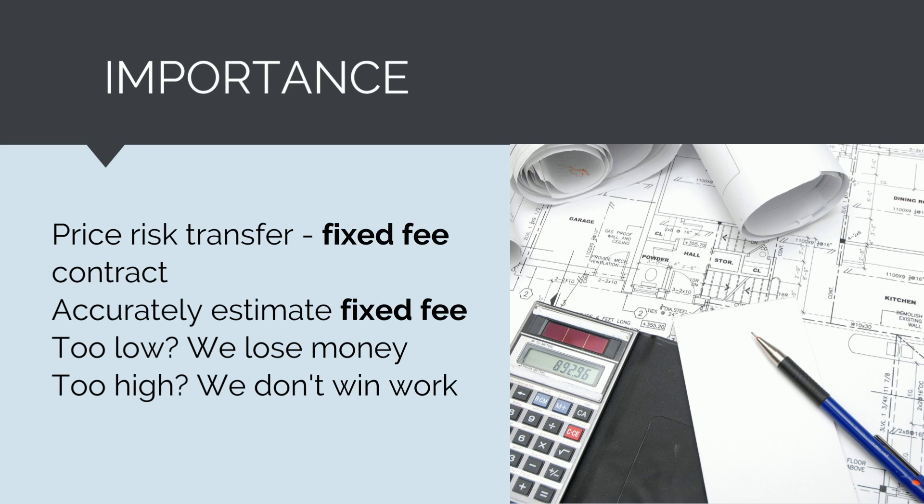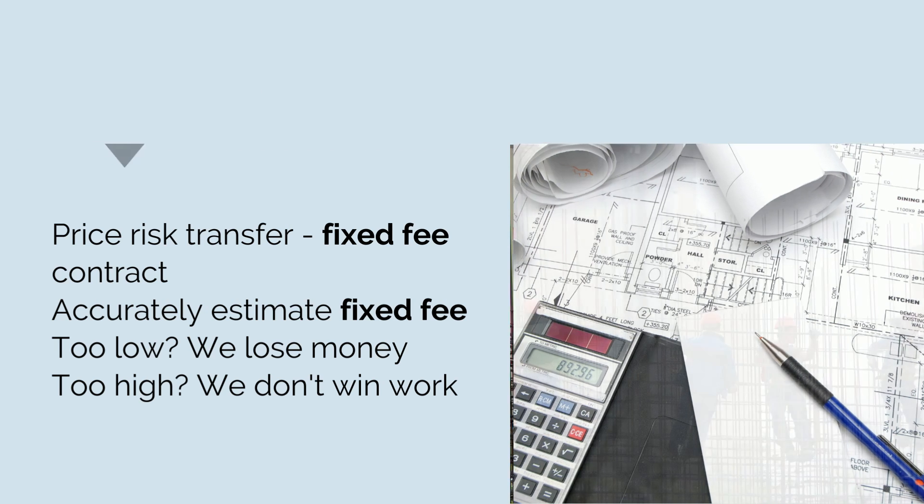As a contractor, to be able to take on the risk and manage it properly, we need to be able to accurately estimate this fixed fee. If our estimate is too low, when delivering the project we won't have enough money. If it's too high, we won't win any work, as no client will sign us up because our estimates will be too high.